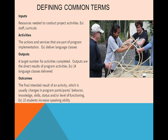Outputs are the products or results of your activities. Outputs are generally phrased as completed activities with a general number. For example, if your activity was to deliver language classes, your output would be 14 language classes delivered. You want to set your targets based on the resources and inputs available. If you only have three teachers, you set a target based on how much time those teachers have. Outputs are frequently the kind of numbers that grantees report out to their funders.